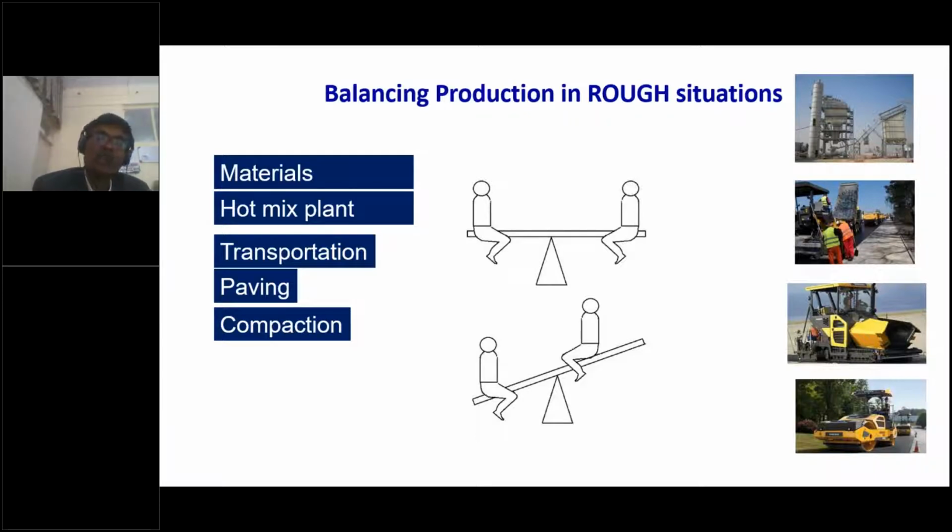My whole chain comes to a standstill, right? My production setup becomes standstill. And what is the financial implication? One load costs several lakhs. I cannot use that. I cannot throw that away. So that is the situation. So balancing the production in the supply chain, on the equipment side, is very important and very difficult. Many times it goes out of our control.